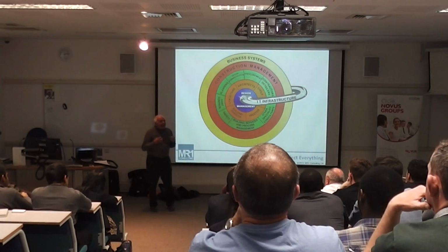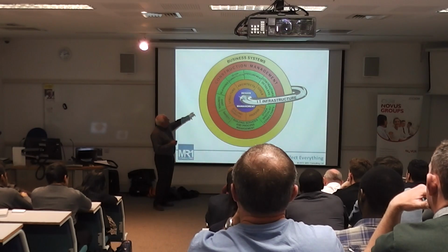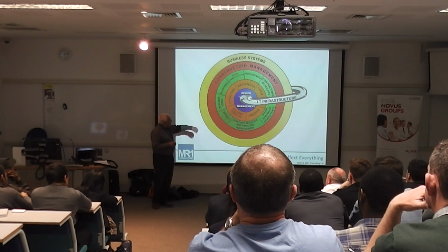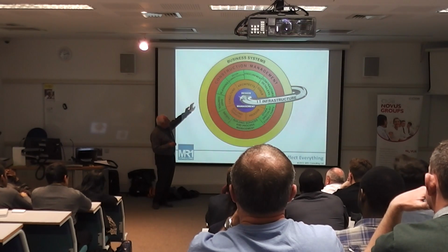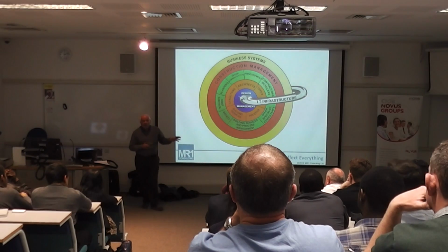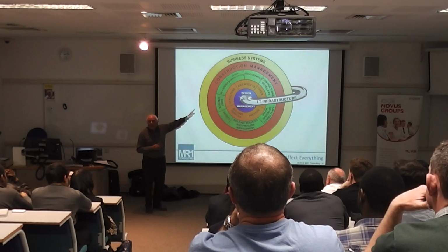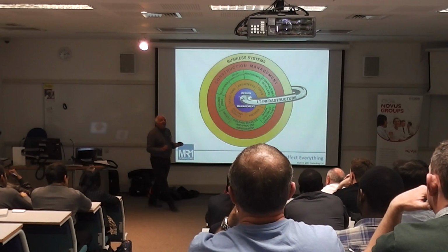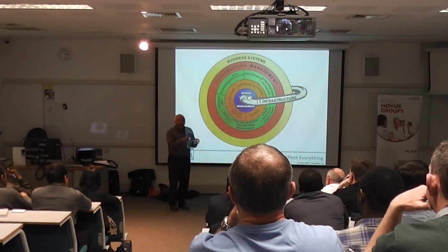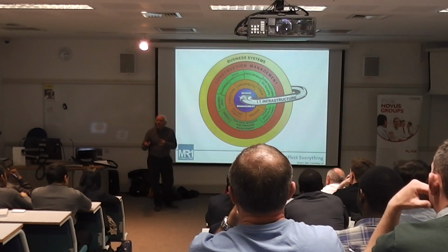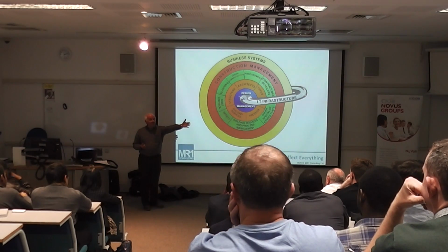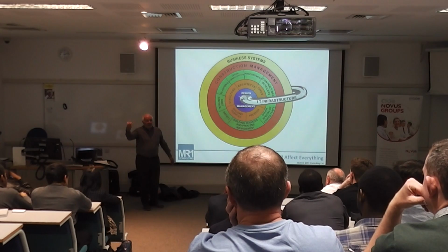But where it is going and is rapidly evolving is into the use of the data that's generated through this process for lots of other things. Building safety, cost control, planning, design administration, construction administration, procurement in particular, now is looking at what you are going to deliver. I want you to code up everything that is going to be delivered to me, so as it comes on the site I can swipe it, it can feed into my management systems, and it will actually put up bills that say you were contracted to deliver this, procured to deliver that, you have delivered this, I will pay you.